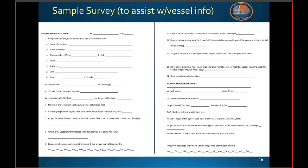District Bridge Offices may be able to provide applicants with marina or facility contact information for various waterways. You should also research and contact private companies that operate in the vicinity, as well as emergency vessel and maintenance vessel operators. If it's a smaller waterway with little commerce but heavy recreation traffic, send surveys to and post surveys at marinas. That's a good way to gather waterway usage from the rec community.